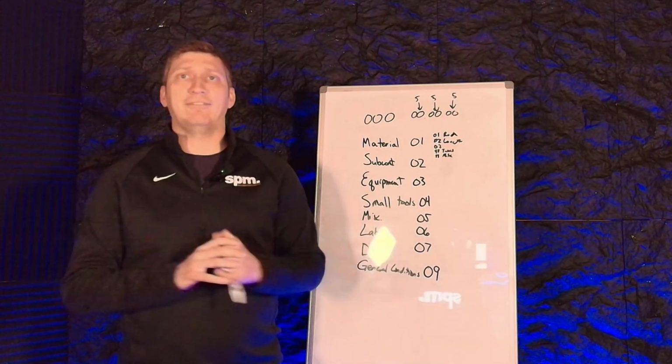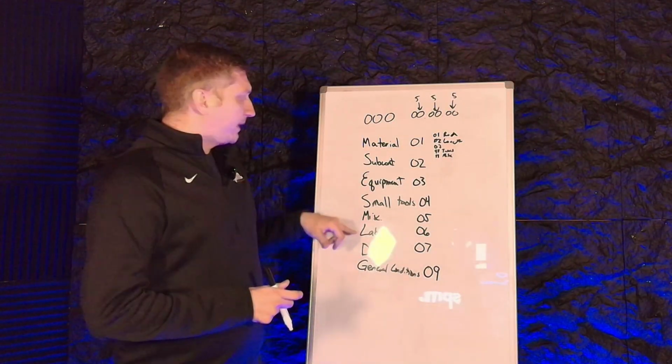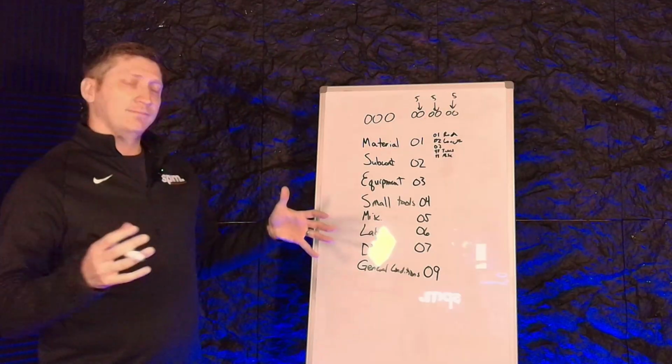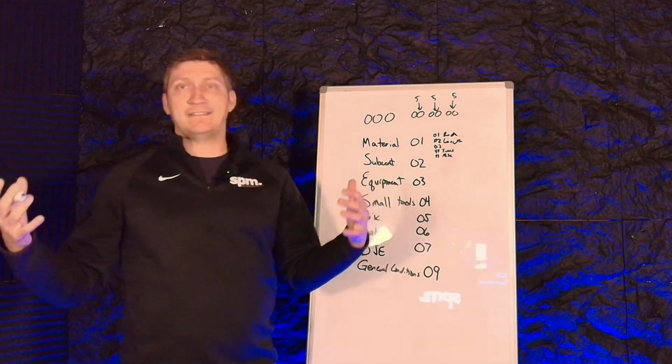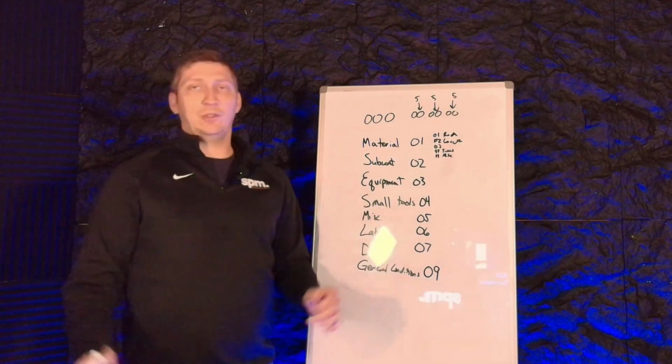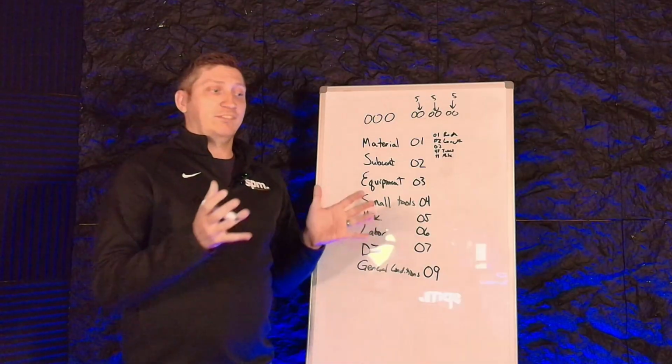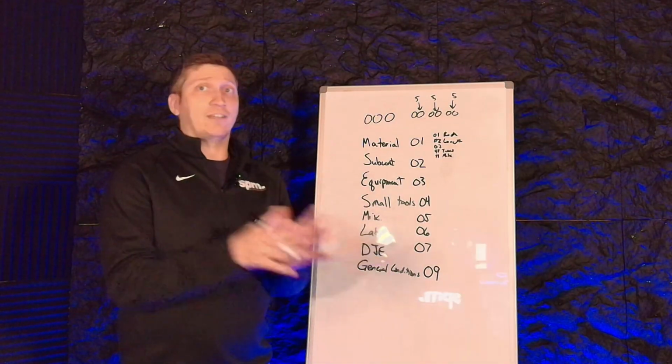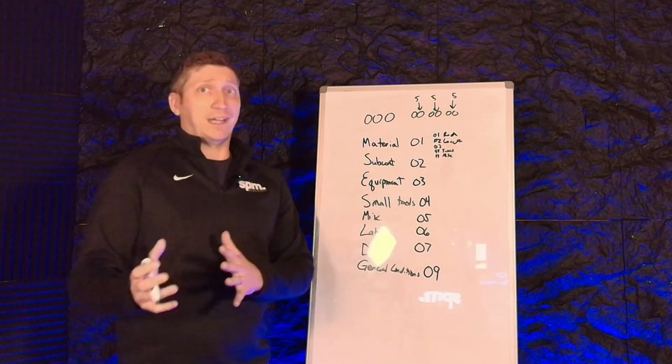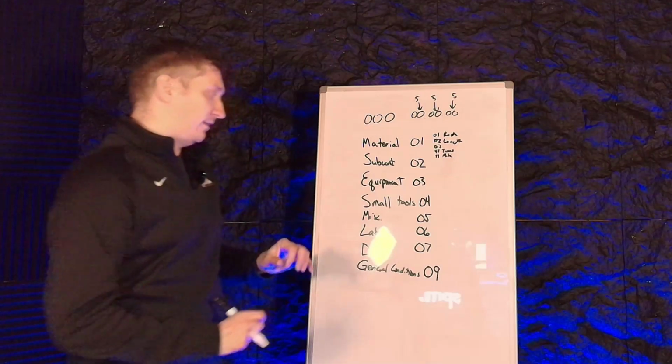We don't need to have that many cost codes. But again, think of these as one-month blocks, and then you can track against how you're doing, how you're trending. You do a whole month of work. If you're 50% done, you have two weeks' worth of work out of the four weeks. Are we ahead of schedule or behind? That's going to be a lot of the point.